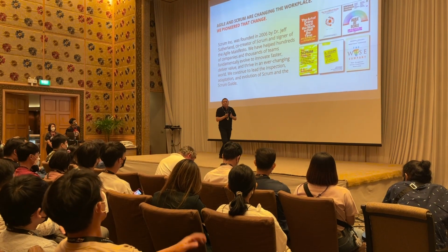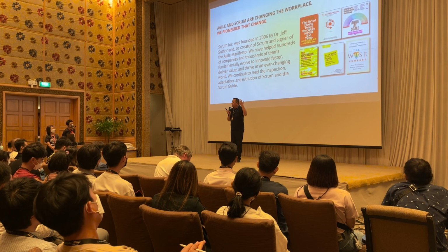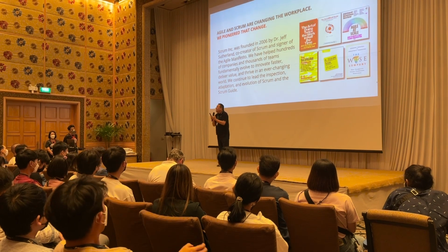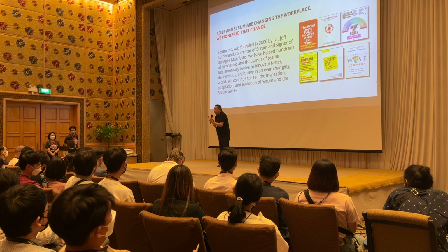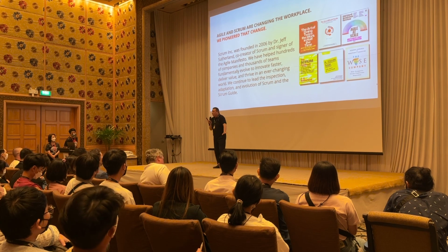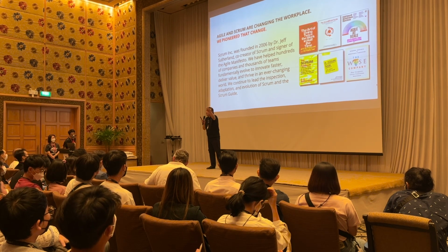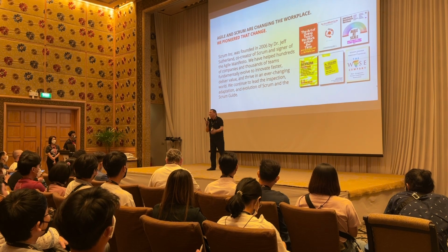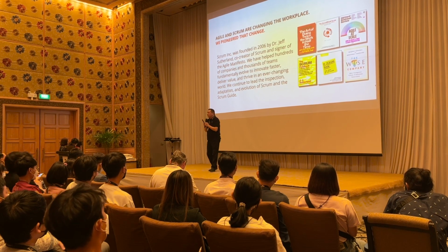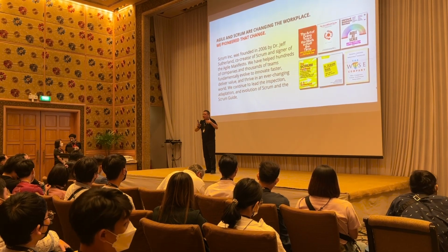Right? To learn Scrum@Scale, you only need to know Scrum, because every team in the organization, including the bosses, will be Scrum teams. There are no other roles like the RTE or any overhead that you need to incur in your system. All you need to do is use back the product owner, the Scrum Master, everything that you know about Scrum. So the Scrum team have their product backlog, the management have their backlogs. You use back the same rules. So Scrum@Scale will be to use Scrum to scale Scrum. And Scrum@Scale is low cost, easy to learn, and you can implement it incrementally. You don't have to roll out everything at once.